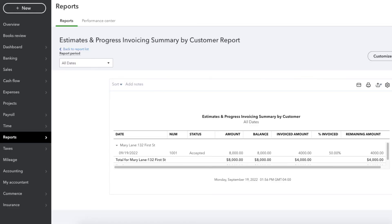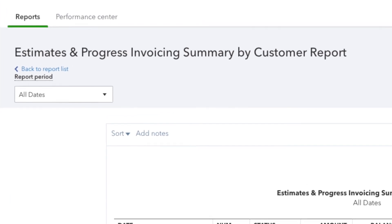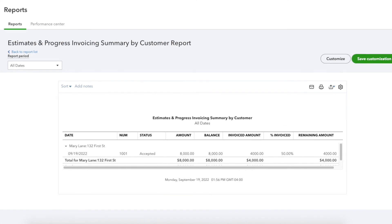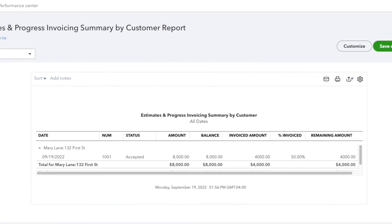You can also track retainers and uninvoiced estimate amounts. With progress invoicing, the estimate shows you how much hasn't been invoiced yet — the last part could be the actual retainer. You can find the estimate to see the remaining retainer and invoice it when ready. Or go to Reports and pull up the 'Estimate and Progress Invoicing Summary by Customer' report, which shows the total estimate amount, how much has been invoiced, and how much is still outstanding.